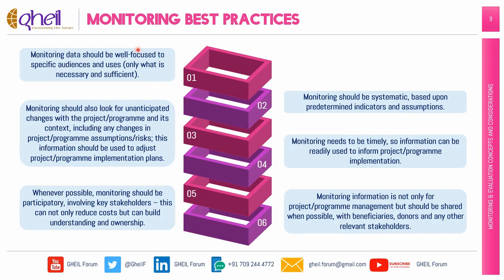Monitoring best practices. Monitoring data should be well focused to specific audiences and uses, only what is necessary and sufficient. Monitoring should be systematic, based upon predetermined indicators and assumptions. Monitoring should also look for unanticipated changes with the project program and its context, including any changes in project program assumptions and risks. This information should be used to adjust project program implementation plans.